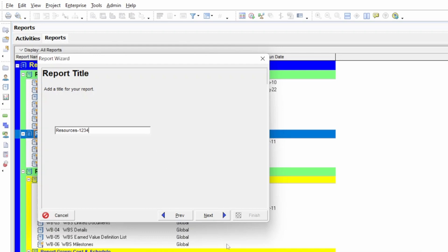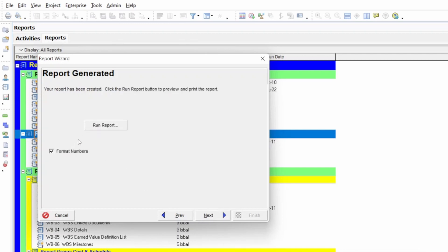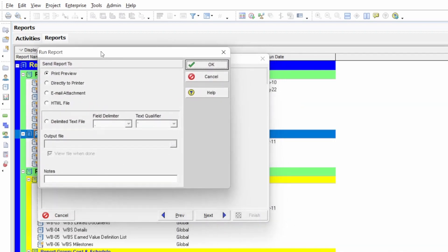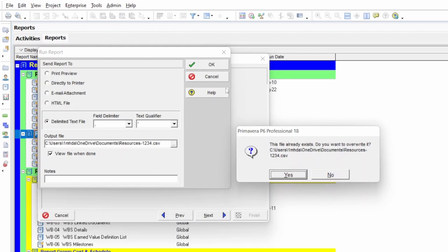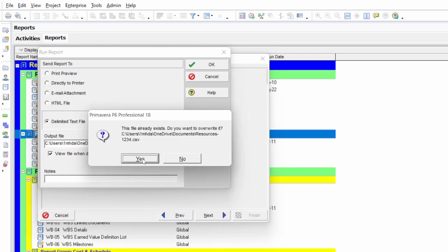Click Next and we are going to run the report. Remove the 'Format Number' checkbox — if you keep it, the report will contain formatted numbers that may overflow into adjacent cells in Excel. To get all values in one cell, it is better to remove this. Then click 'Run Report' and select the output option 'Delimited Text File,' which gives you an Excel sheet for easy calculation. Press OK, and if the file already exists, just overwrite it.